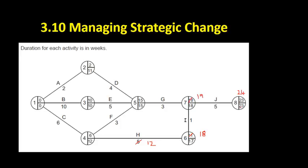So we know now that the activity should take place in 24 weeks. Well, that should allow us to meet our target of 25 weeks is what we could say in an answer. However, there's going to be less slack. If we had 23 weeks to complete a 25 week project before, there was two weeks slack. Now there's only one week.